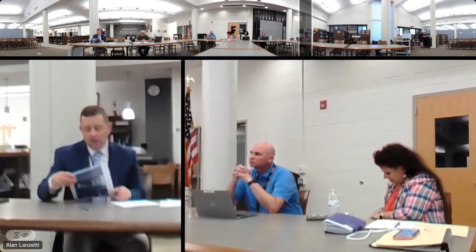I had talked to you about how we were going to build a dormer on the back for the HVAC portion of the project, and we were going to have this contractor do it. We asked him to price it, and he came in with a very high price because there's no competition. So we opted to pull it from him, and we're including it in the scope of the HVAC project, so it'll be competitively bid. But for starters, I'll pass this along to see some of the progress that's going on out there.